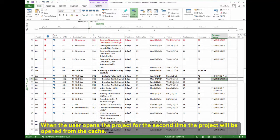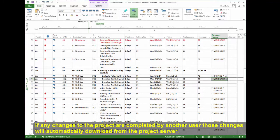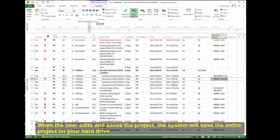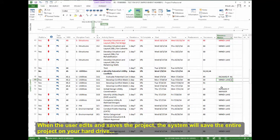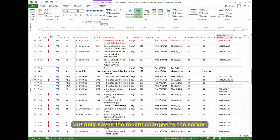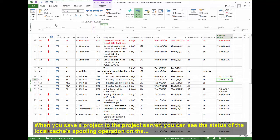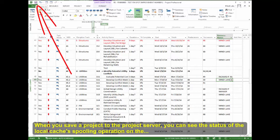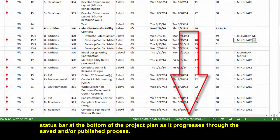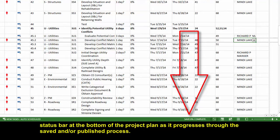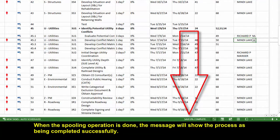If any changes to the project are completed by another user, those changes will automatically download from the project server. When the user edits and saves the project, the system will save the entire project on your hard drive, but only saves the recent changes to the server. When you save a project to the project server, you can see the status of the local cache's spooling operation on the status bar at the bottom of the project plan as it progresses through the save or publish process. When the spooling operation is done, the message will show the process is being completed successfully.